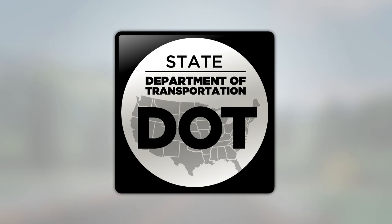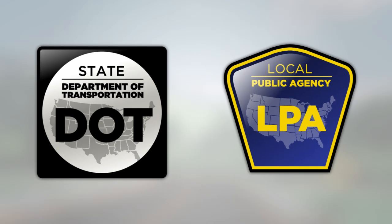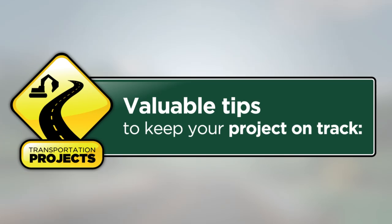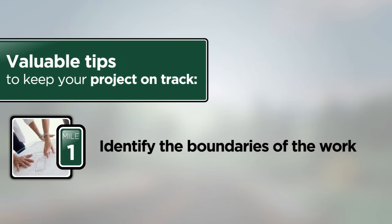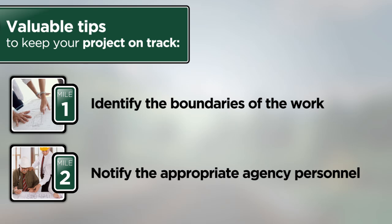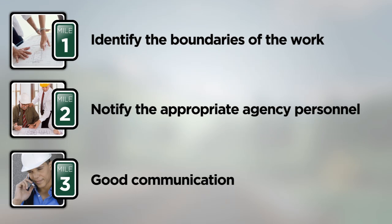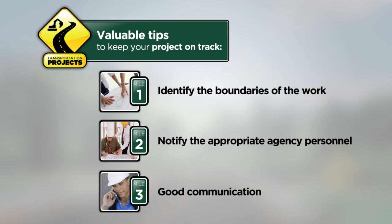Your State Department of Transportation, or State DOT, may allow you, the local public agency, or LPA, to manage the right-of-way acquisition for your project. The agency responsible for acquiring right-of-way is normally determined by the project agreement between you and your State DOT. As you are developing your Federal-aid highway project, here are some valuable tips that should help keep your project on track. During the design phase of a project, you should identify the boundaries of the work and determine if construction activities will affect any property adjacent to those you own. Notify the appropriate agency personnel that there will be right-of-way acquisition needed so the process can begin. Good communication with those responsible for acquiring the right-of-way for your project is key for keeping your project on schedule. This will help you identify issues early on, as right-of-way acquisition can become complex, and will allow you time to make needed adjustments to the project design.